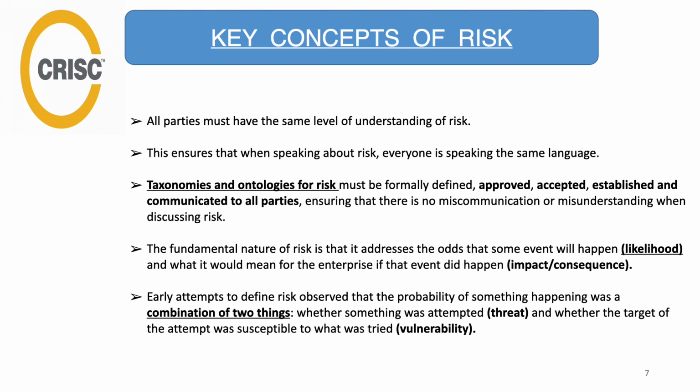Knowing the potential losses associated with the risk provides a basis for deciding how to respond to a risk beyond what is acceptable, since it makes no sense to spend more to respond to a risk than the cost of the risk itself. Right? Just imagine one thing, like we'll discuss with the example.